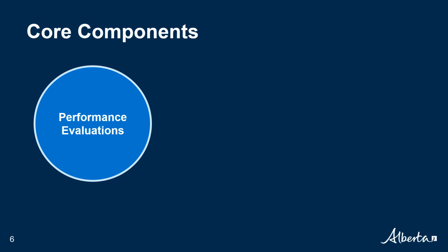Conversely, an evaluation result below 3 represents improvement required in the vendor's performance. The evaluation result contributes to the vendor's 3-year rolling average called an Overall Vendor Performance Rating, or OVPR for short. Performance evaluations are covered in more detail in Modules 2 and 3.